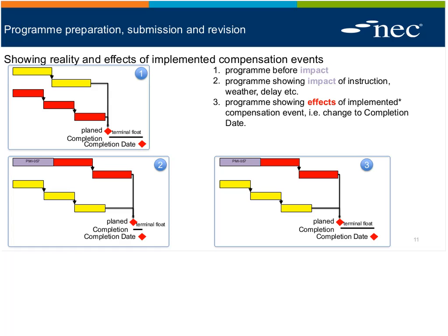Remember we were talking about pairing of dates, so there are various contractual deadlines which only move through the procedures, the conditions of contract. Those you're always looking up your contract administration trail and populating your Gantt chart with them, whereas plan completion is whatever it is. That just moves in and out. Plan completion could be on, before, or after the completion date. That's the date by which the contractor believes he will actually achieve completion. So running dates explained.